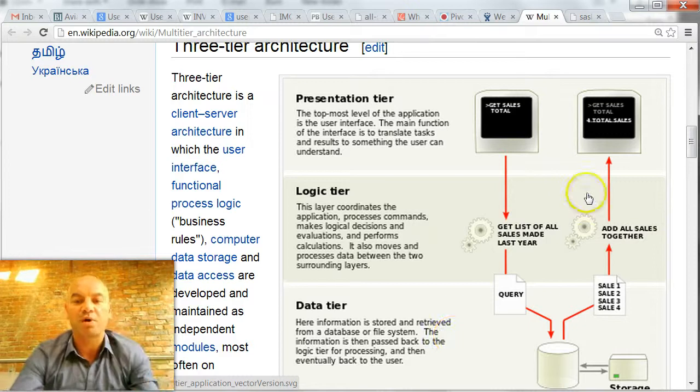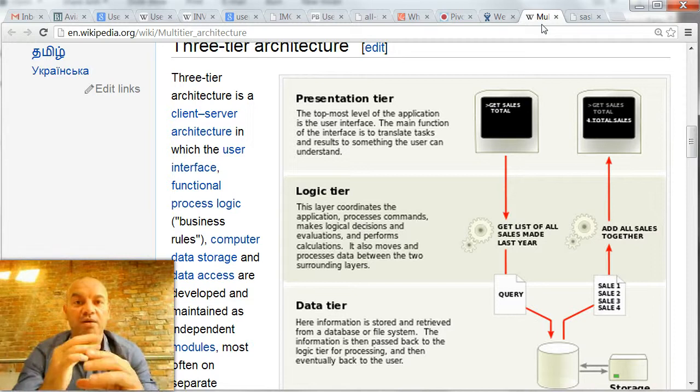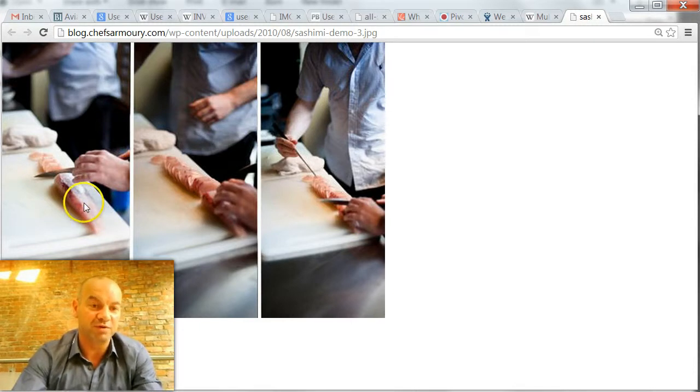Then someone else or I might go and create all of the logical code, and the designer might meanwhile be getting on with the entire user interface. Now, when you move to Agile and Agile releases, you've got to whittle that down, and you've got to start slicing this stuff up sashimi style. So if you can imagine, that's your whole MVC architecture, model view controller, or your UI, your middleware, and your back end, to use the old terminology. You want to be able to slice that stuff up into user stories. So that's sashimi. It can be done. There's a trick in it.